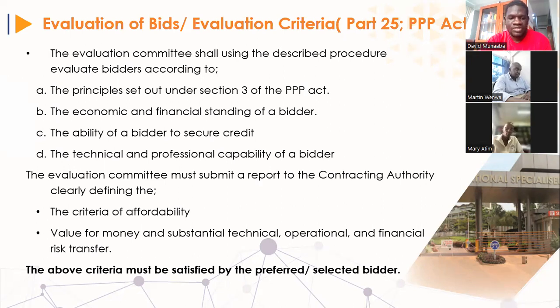given project. So the evaluation committee must submit a report to the contracting authority clearly defining the criteria of affordability and value for money and substantial technical and operational financial risk transfer based on their assessment of the preferred bidder.